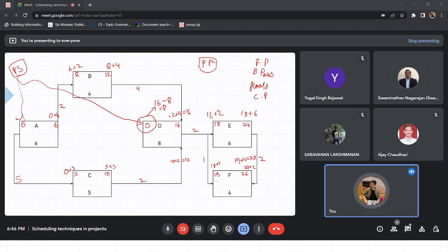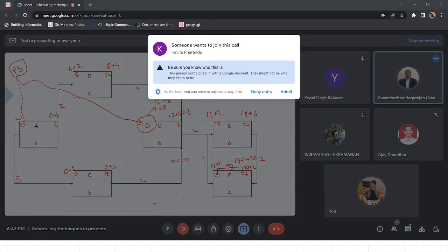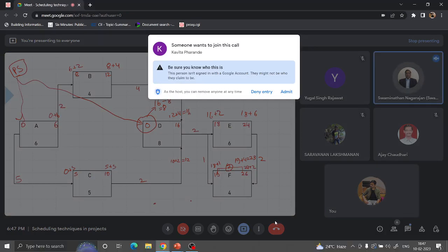Is there some problem here? I mean, the activity is only of 4 days, but it is starting at the 20th day and ending at 26. This shows the duration as 7. Yeah, but that's because we are trying to fulfill both the conditions. This happens because this is an interruptible activity execution, like from 19 to 26. What you are saying is 19 to 26, 2 days. Actually, there will not be any activity in F, right?